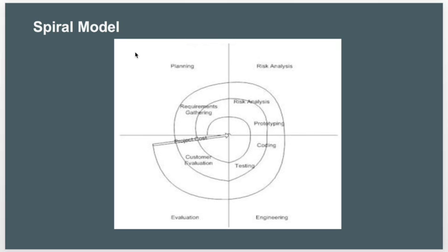There are some cases where it is good to use the spiral model: when cost and risk evaluation is important, for medium to high risk projects, for long-term projects, when users are unsure of their needs, requirements are complex, a product line is needed, and significant changes are expected. In these cases, it is good to use the spiral model.